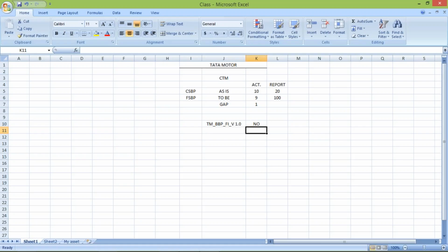What modifications do they want? They'll specify them in the mail itself, and sometimes they will color the text, saying you need to replace all this yellow color text or red color text. These kinds of instructions will be given by the client. So once again we are going to incorporate those changes in the same document, but we are going to change the version. Earlier the version was 1.0, and now I have made certain changes and changed the document name, in the sense, I just changed the version name itself. Whichever changes were suggested by the client and your core team member, we have incorporated, and then once again we have forwarded this to the client asking them to kindly go through this blueprint and give confirmation that they are okay with all the processes we have specified here.